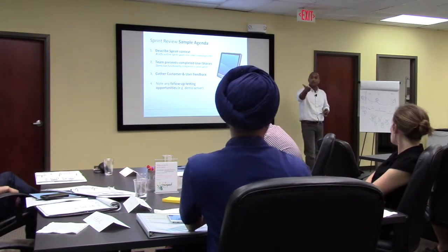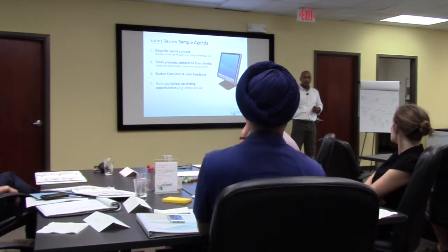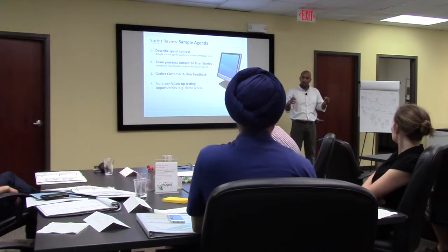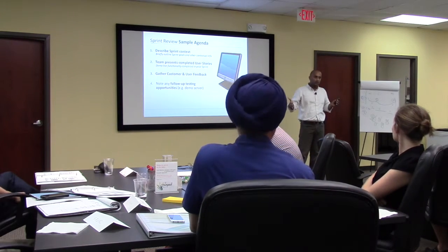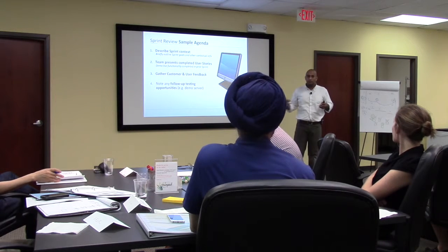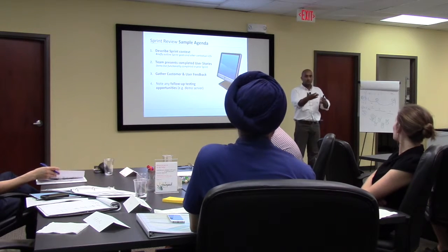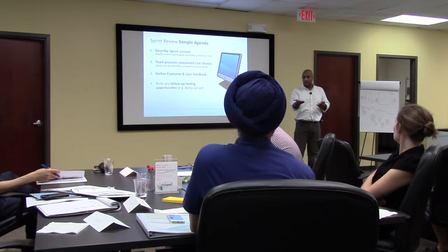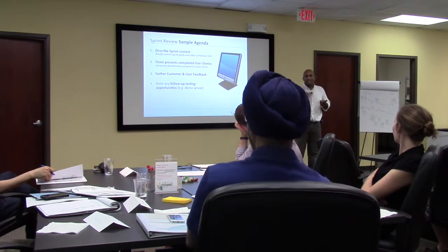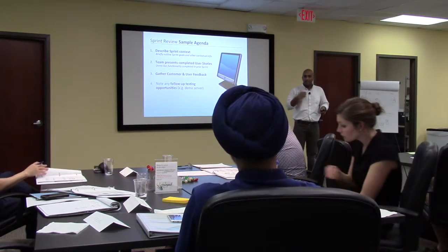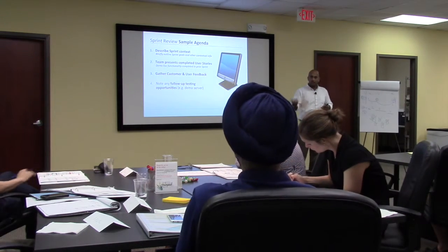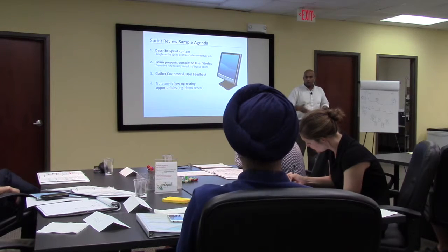Yeah, so the scenario you described is basically what I've seen in most companies that claim they're doing Agile or Scrum. What happens is the product owner waits till the end of the sprint, and then in the sprint review, the product owner is actually getting a demonstration or review of the stories that were completed by the team. That's a bad practice, right? You don't want to wait till the end of the sprint to accept the stories. As and when the stories are done, the product owner is engaged, so they're going to be looking at and reviewing the stories. So they're going to be accepting them throughout the sprint.